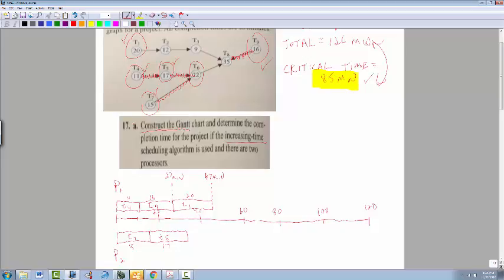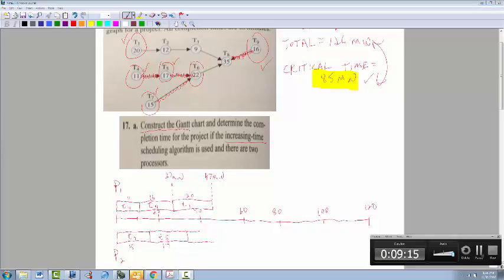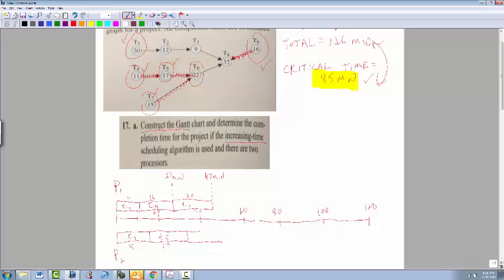So now we can assign processor 2 T6, and that is going to be 22 minutes added to 32. Oh, here we go with my math. With the crazy clowns in class getting louder and louder in here, let me hold off. 54 minutes. That's 22 plus 32. And that is T6 being done.